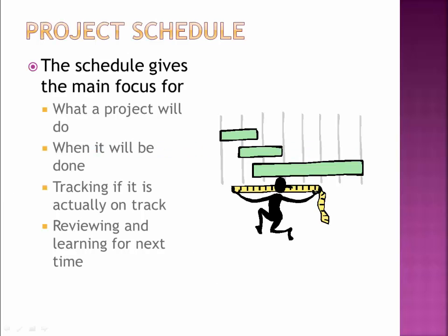One of the things we have to understand is that the schedule determines much of the cost of a software project. It's easy to say, I think this will take a week to do, but that week is going to be intertwined with a bunch of other tasks. There's very seldom the ability to just say, oh, this is a 7-hour task and that's all it's going to take from a certain person, because people have to be around, they have to be available, they have to be able to ask their questions, they have to attend status meetings. There's always a time factor that comes into it.